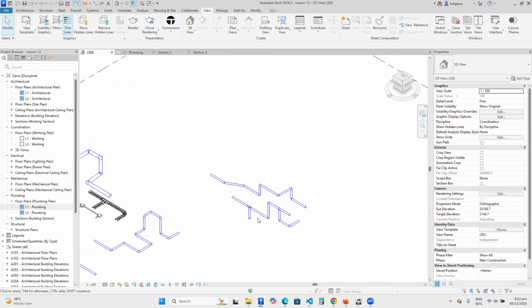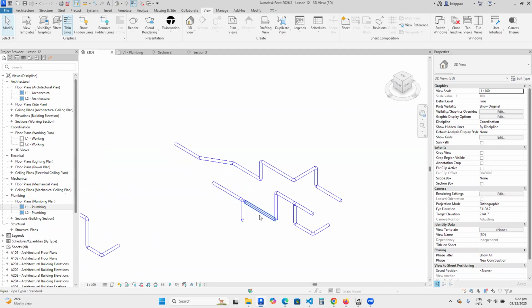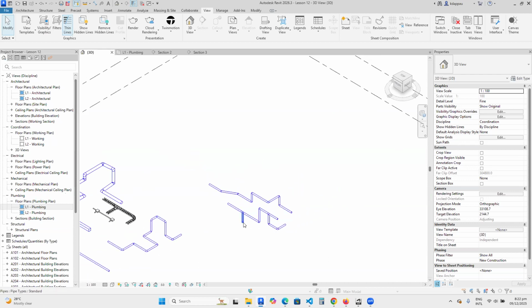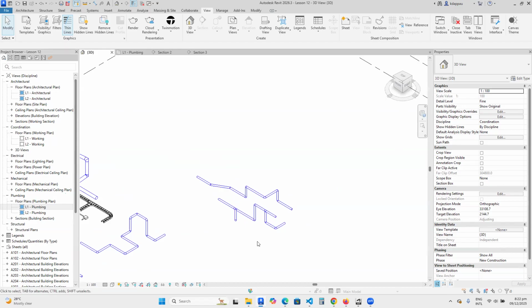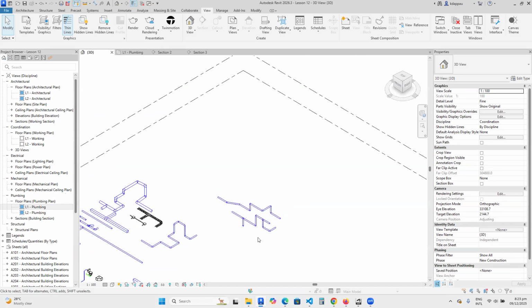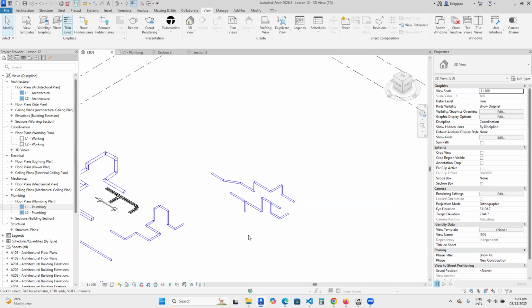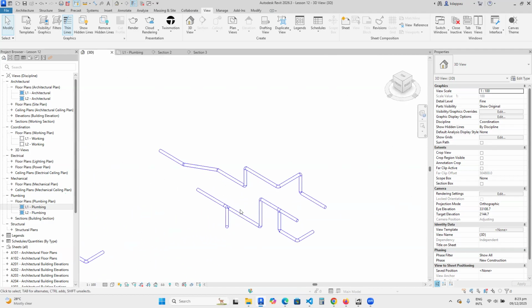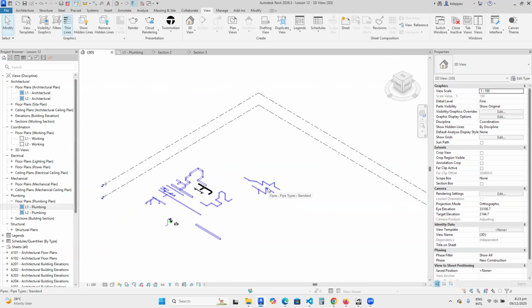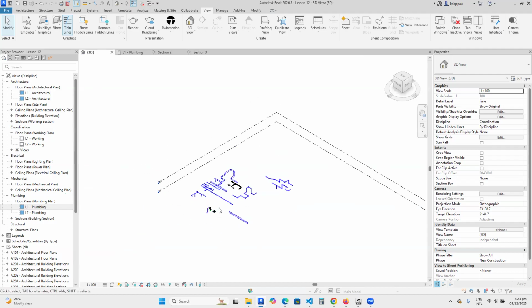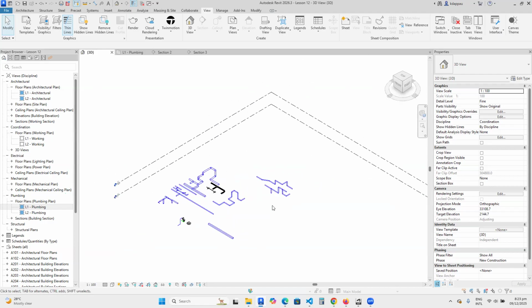On a typical construction site, people lay the pipes before we fix the WCs. In architectural drawings, we place the WCs before we connect the pipes. You should understand these systems very well so that you can utilize them. Ideally, sitting in this empty space and drawing pipes will not make sense in any way. So for better understanding, I'll need to bring in a building. Then within the building, I'll know where to pass my pipes and where not to pass my pipes.